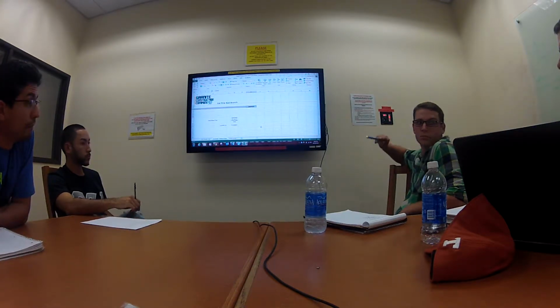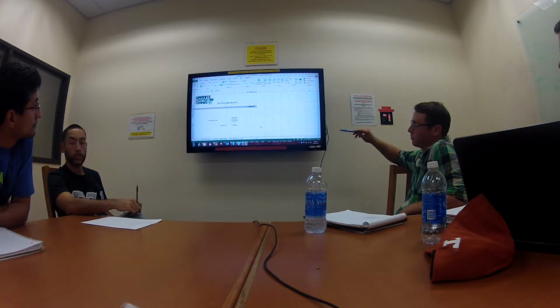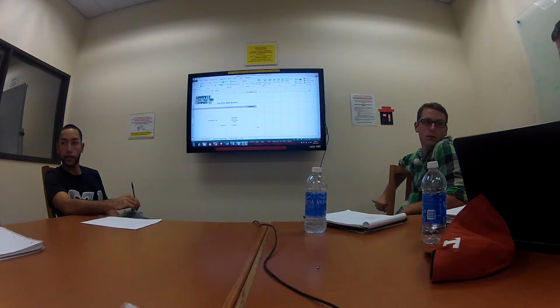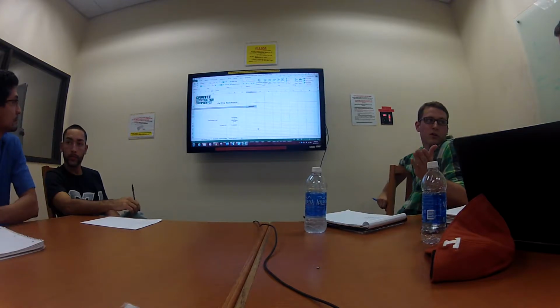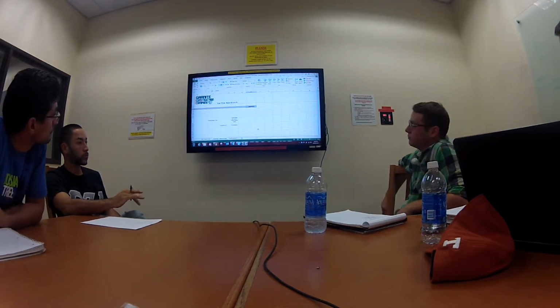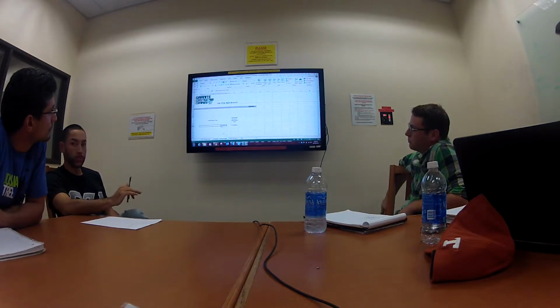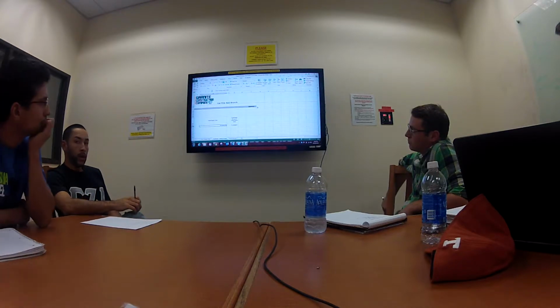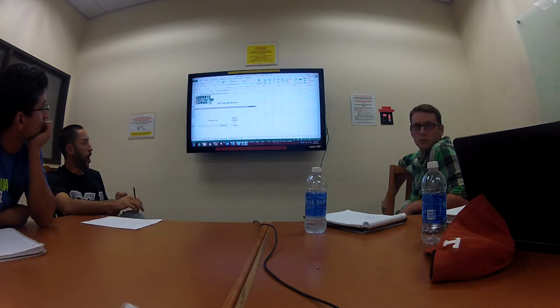So your direct, whatever that was, plus that 380, equals your total budget cost, and then you put your profit margin on top of it, 35% on top of that. Right. So my total direct cost is $913,000. Right. And so that means since we have $380,000 of indirect, there's 41 cents of indirect cost for every dollar of direct cost.